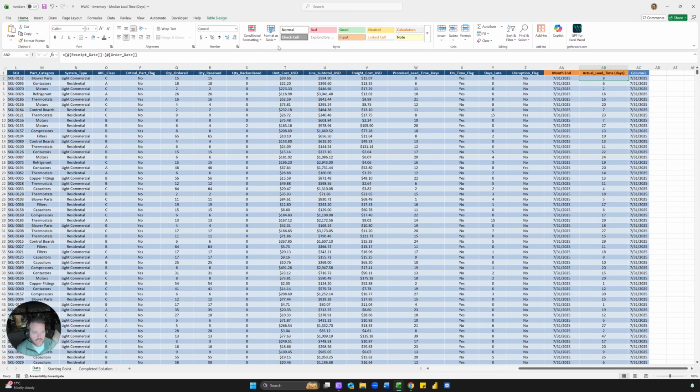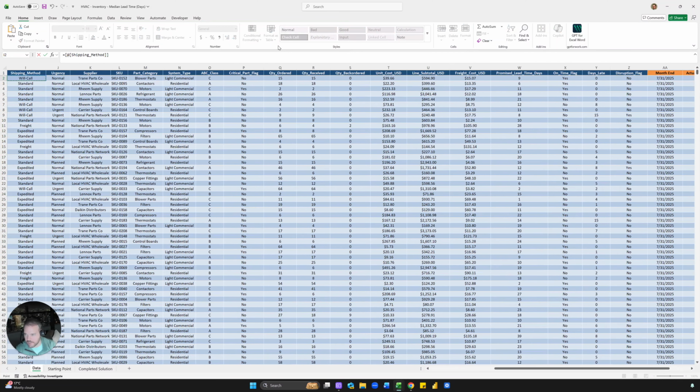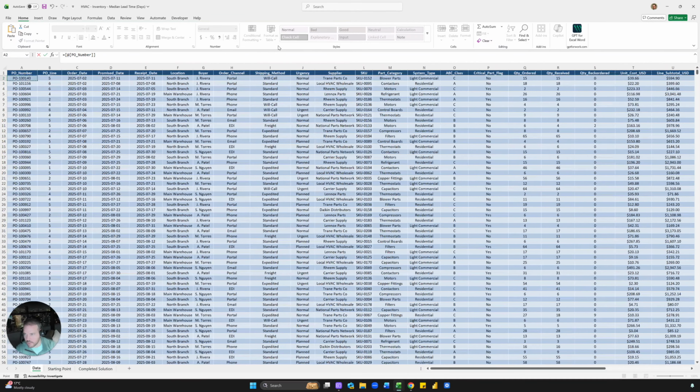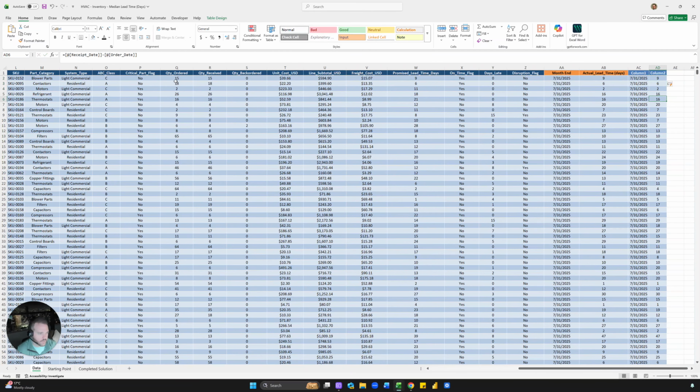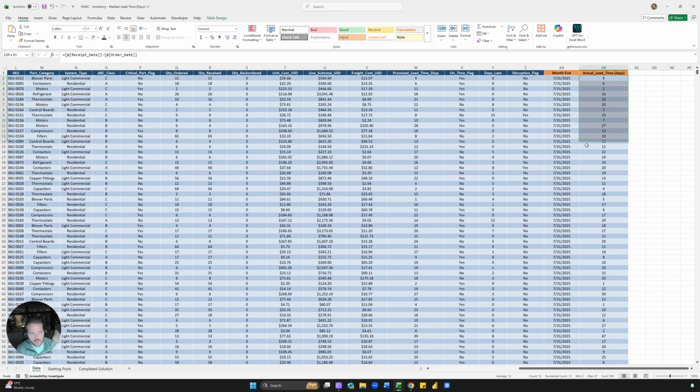Okay, and then the next thing is just actual lead time in days. So equals the lead time is going to be the delivery date minus the order, like the receipt date minus the order date here. And so you can see all that matches column A, B. So that's how you calculate that. That's how I got this. But you can delete this, and then now you can start to do your analytics to get your insights.